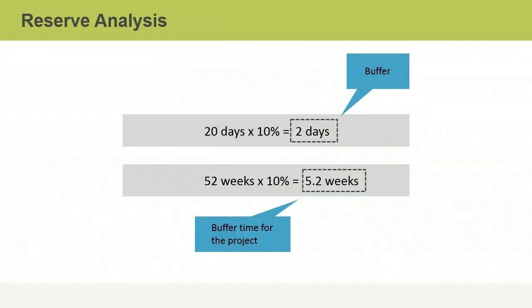Project managers frequently add reserve time or contingency reserves by increasing their initial duration estimates by a fixed percentage. Reserve time buffers can be added to the total project time, or they can be added as a chunk of extra time for specific activities. Reserves can help offset uncertainties or risk in the project.